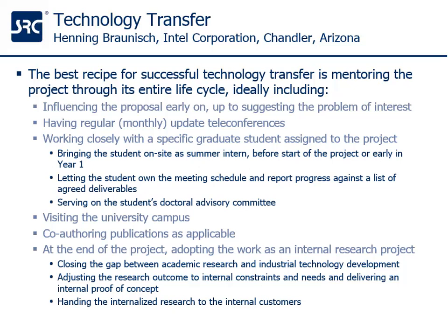Typically I target a monthly teleconference. Sometimes it slips a little bit, maybe 4 to 6 weeks. For sure, I set a reminder in my calendar to make sure that we set up the next update teleconference. Unless, as in the next bullet, you are able to get your student to take ownership of all of this him or herself.